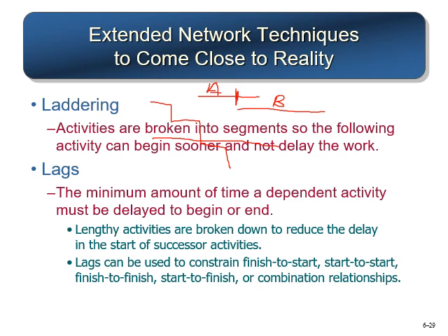Then there is lag. You have activity A. If I draw a box here, activity A and activity B, I can always give some lag. It may not be 0, like right after you end activity A you may not start activity B. There can be a lag of 5 days. So that's lag, and that might be required in some projects.